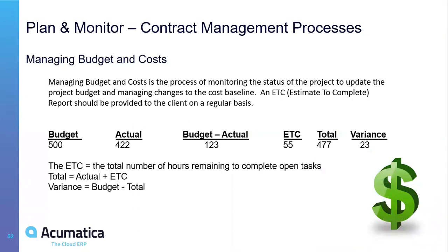Control the budget. You have the budget in the statement of work, so you know what the hours are, or here in Asia it's most of the time days, that I have to use. You should have in your organization time entry systems, I assume. If not, try to track it in your Excel file where you do your schedule, include the numbers there. And this is our suggestion how to do it and to keep track of it. So the first number you need to know is how many days or how many hours I have for the project.